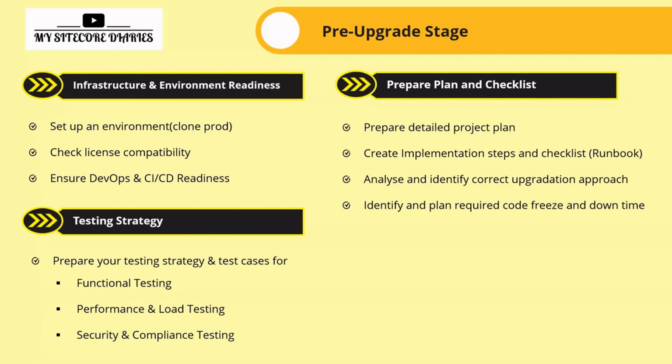Identify and plan the required code freeze and downtime. You might need a code freeze in some places, a content freeze in others, and some downtime might be required. As per your project requirement, you can take a decision on that and get approval from your business also.